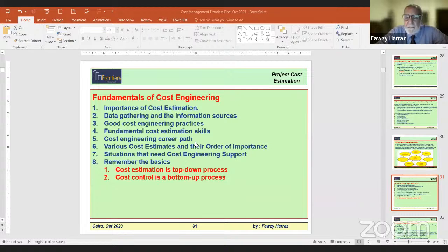That's one estimate. But the example that we've just seen, this road estimate, definitely will take you weeks and weeks. It can cost you 2,000 man-hours to prepare the estimate. And the estimate will go not on 1 page, but may go on 200 pages. And I'll show you a refinery where the estimate can take maybe 3,000 man-hours and will take 3 months to make. Lots and lots of information input from various internal and external sources.